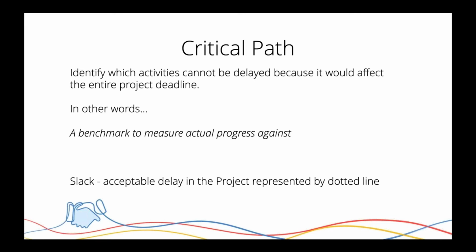Because there are things in your project, like maybe reviewing material or training material that needs to be created, where it's not going to affect the entire deadline of the project, versus there's a deliverable that if that particular one is delayed, it's going to affect everything, right? So it automatically knows, even though you can label it as a high priority task, the system is going to look at the Gantt chart and figure out what those items are, and will highlight them for you. And so in reality, of course, things can get delayed and moved around. People get sick, people aren't at work, people reassign tasks. And so this also can be another way to use it as a benchmark, right? And to make sure that your actual progress is going as the benchmark says as well, right?